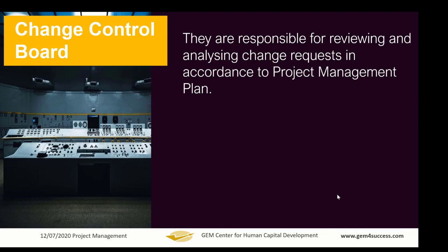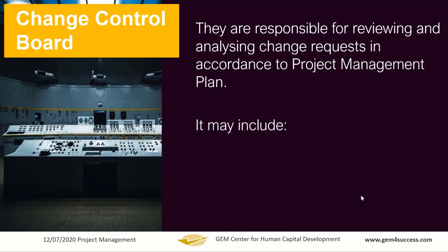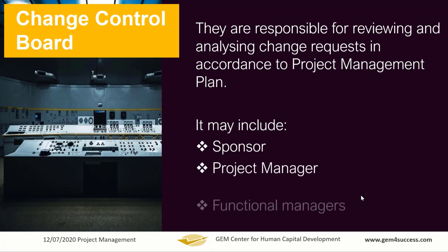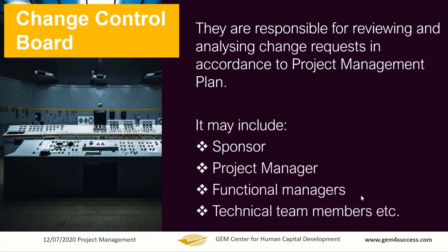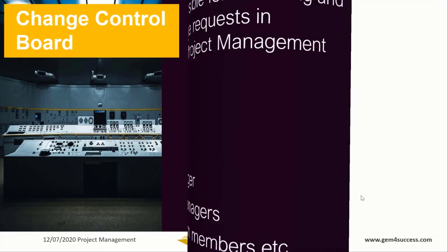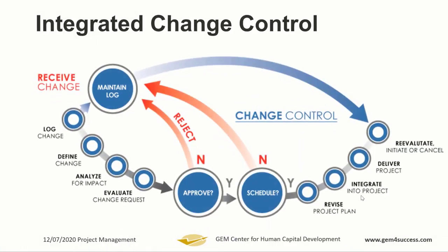So they are responsible for reviewing and analyzing change requests in accordance to the project management plan. Note, in accordance to the project management plan. It may include the sponsor, definitely, project manager, functional managers, or technical consultants, or other members. So this is like a workflow for us to understand the change control process.